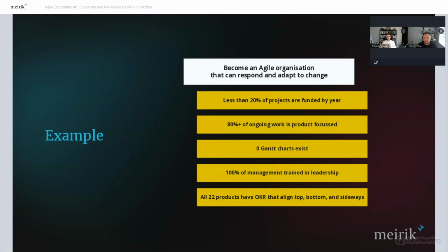So is there still a need to track these measurements? Maybe something else is more important. So I see two cadences that the team needs to agree on. One would be review of the OKR. Should we leave it as is, remove a key result? And another one is a more frequent cadence, maybe every week or every 2 weeks, to set very short-term tasks that will do something with key results, move us closer to the target.